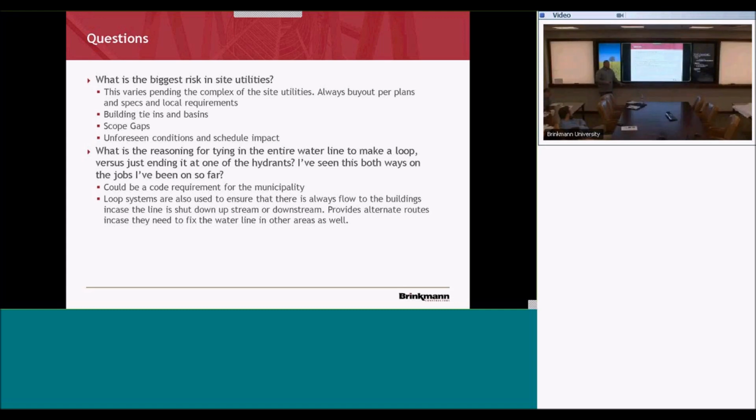And that's when you can use potholing to help find that if it's on your site. Because they're going to come mark out what's in the easement and what's public. If they have the information available, they'll mark out what's on the private side as well. But if they don't have that information, the 1-800-DIG-RIGHT might not provide that location because it wasn't available. The other thing is on the QC forms, there is a location for the underground locate number, so that should be on the QC form so that we've actually looked at it to make sure that they called it in and that it is current.